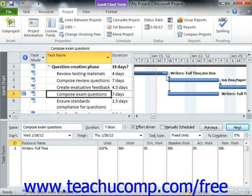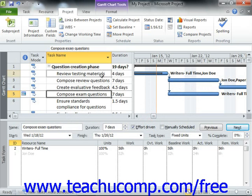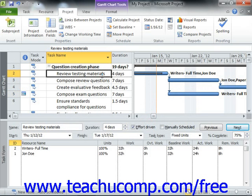Note that if you only wish to update multiple tasks as of a selected date, but not necessarily all the tasks, you can also do that using the Update Project dialog box. In this case, first select the tasks to update within the Gantt chart view of your project file. Remember that you can select multiple non-adjacent tasks if needed by holding down the Ctrl key on your keyboard and clicking on the task names.